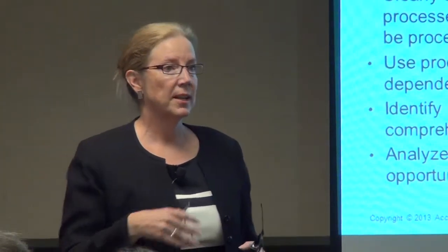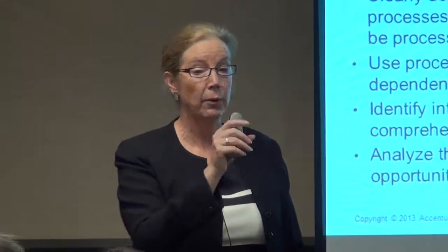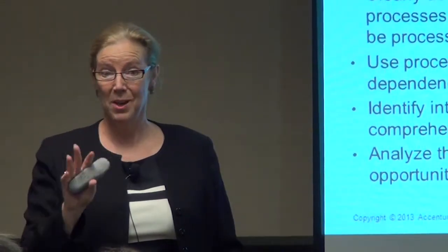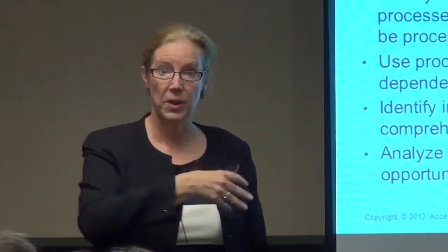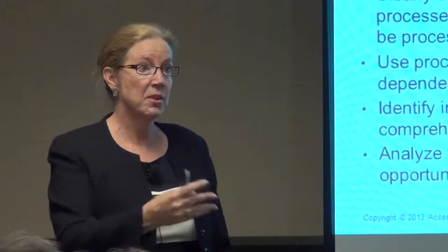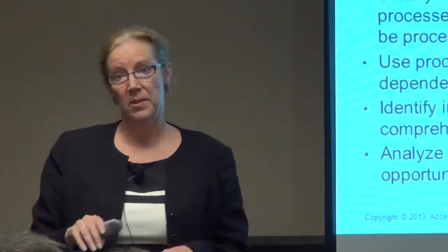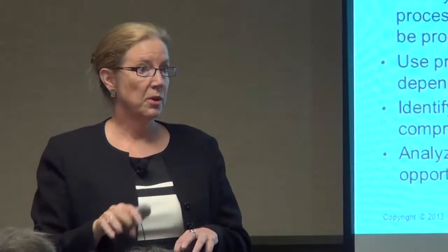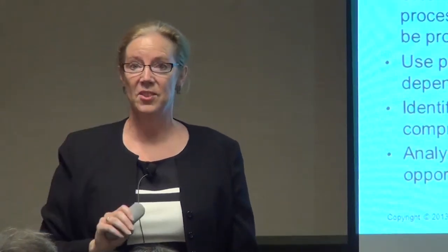So let's say it's some application that allows people to get their benefits information online. Before you talk about how you do it today, because if you spend a lot of time documenting how you do it today, you end up with how you do it today, and then you configure a large expensive system to do what you do today, which is kind of crazy. Instead, have someone who knows how the system works show you, well, this is how it works. Okay, so I'm a constituent, or I'm a person that works in this department, and I log in here, and I get my information, and this is how I work. And then have this discussion.